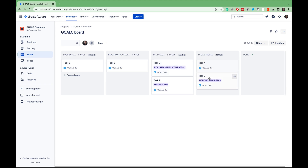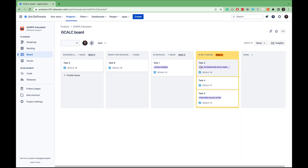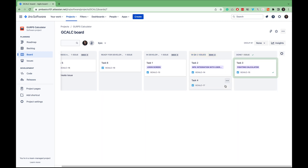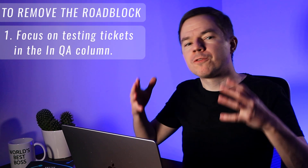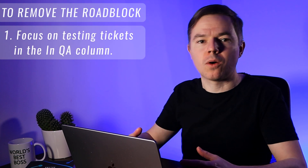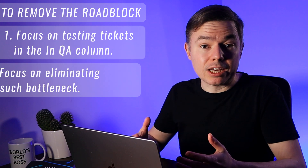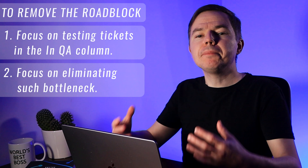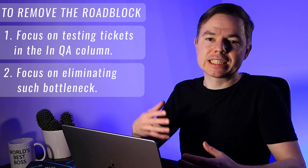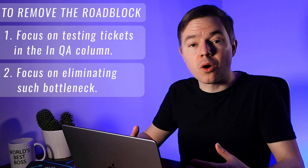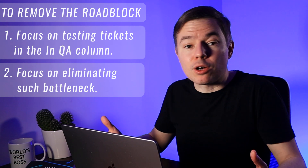I'll set the in QA column to two as well, even though we have only one QA engineer. The idea behind work in progress limits is simple. At some point your board will fill up — for example, two tickets in development and two in QA. Imagine a developer finishes a task and wants to move it to in QA, but we're already at the WIP limit. Instead, you need to do everything possible to remove this roadblock. First, ask people to focus on testing tickets in QA to move them out of the way. Second, on a daily basis your team should focus on eliminating bottlenecks where tickets are stuck or pile up too long in one status. It's the essence of the Kanban approach.